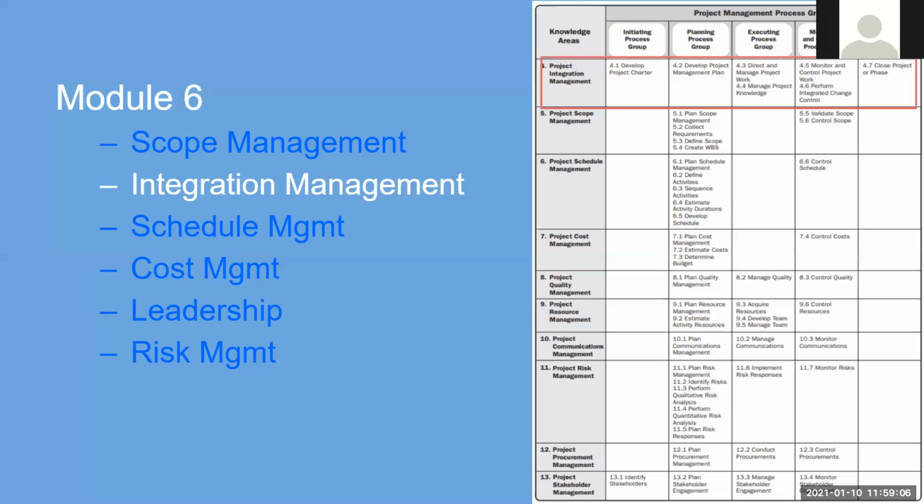I think I saw somewhere that WBS had something to do with the product and the project itself. Yeah, so you have two ways of presenting the work, either by the process, how you do the work, or by the final result of the work. Either way is fine. If we did this by the product, the deliverable, the end result, that being the teen fair actually working out well.